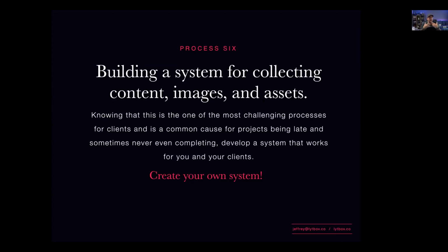So knowing that this is one of the most challenging processes for a client, it's also one of the most common causes for a project to go late. And sometimes projects never even finish simply because of content. And that's really sad because this is somebody's business and they hired a professional, or somebody they're hoping will step up as a professional, to help them have this website.